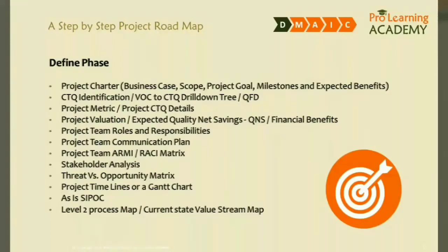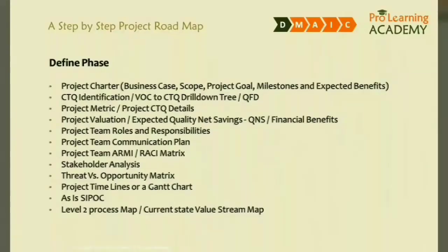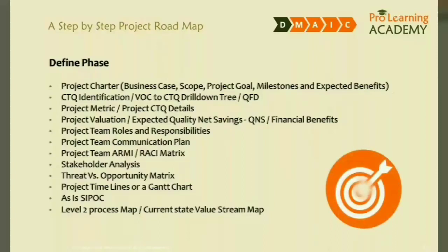Let's discuss key components of the define phase. The define phase ideally should have a project charter. This project charter will have a business case, a project goal, project problem statement, scope of the project, milestones, and expected benefits.